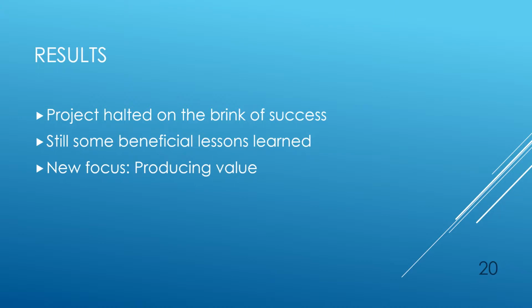Having only about 1 month left to complete the project, the decision was made that a full RFP, or even a scaled-down one, was too much of a risk. However, that didn't mean that some hard work and scrambling couldn't provide some information for the dentist to consider going forward. The solutions investigated, main features of each, and of course the costs, were prepared as a deliverable and are detailed in the next section.